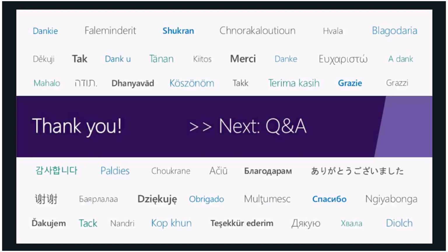The second aspect is the timing. So first, it would be too late. You would need extra time after UAT. If you were indeed going to plan on using production as a non-production environment, the activities would happen really, really too late.